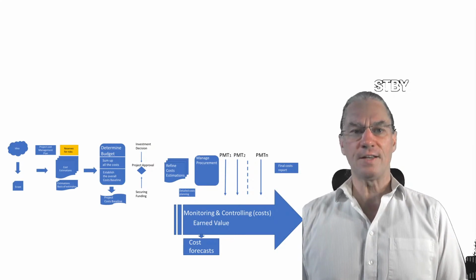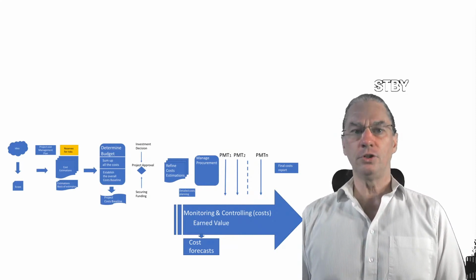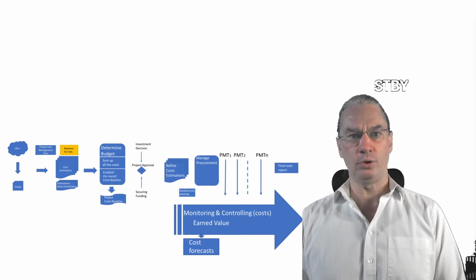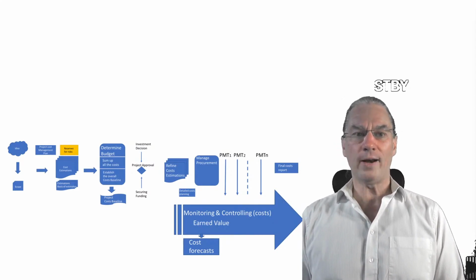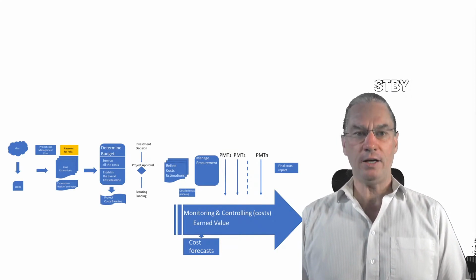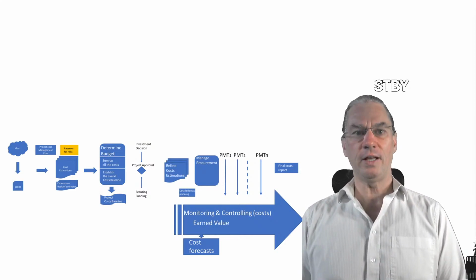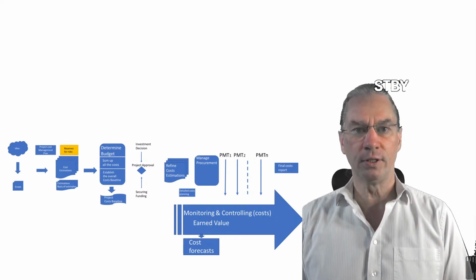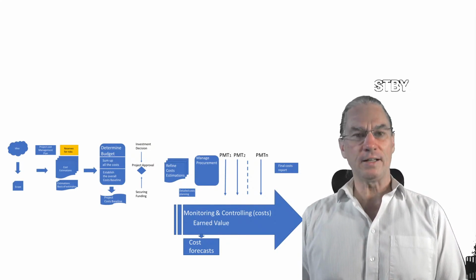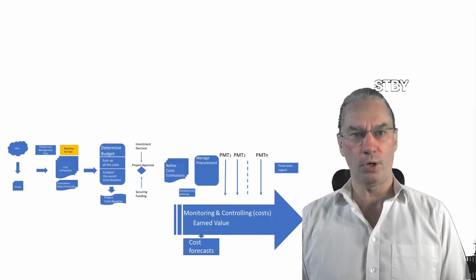Now, if as a project manager you aren't in charge of the budget or the costs, this can happen, and it happened to me several times, the bills go to a line manager. I just have to approve, to say yes, the work was done, yes, the equipment was delivered. But it's a line manager, like a department manager, who will do all the accounting and cost follow-up of the project.